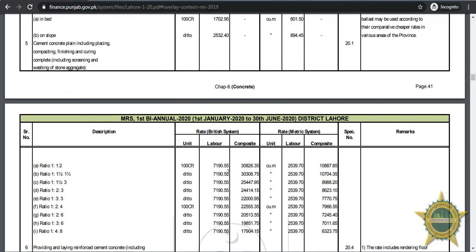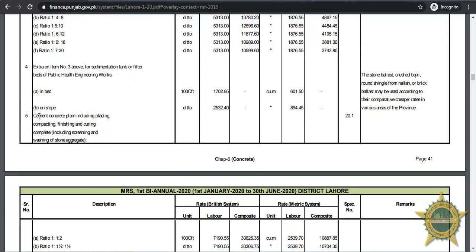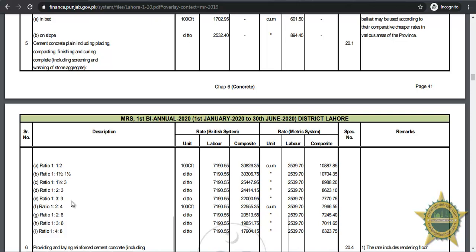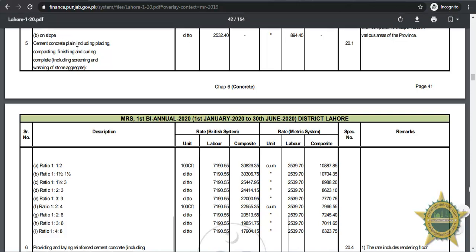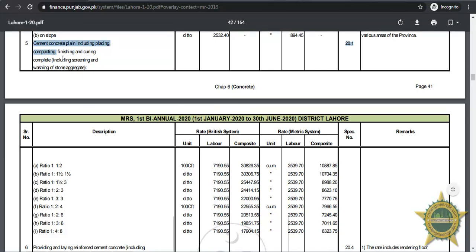Let's look at another activity: plain cement concrete in foundation, including placing, compacting, finishing, and curing, including screening and washing of stone aggregates. The rates given include all these activities. For ratio 1:2:4, let's say 400 CFT — the labor charges are 7,190.55 rupees and the composite charges are 22,550 rupees. Similarly, if you want to see in metric units, there are two columns which you need to follow.